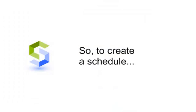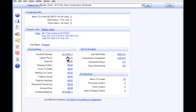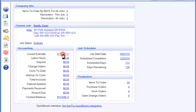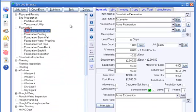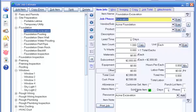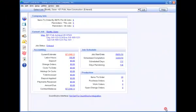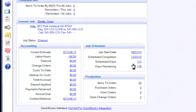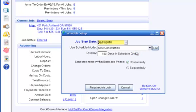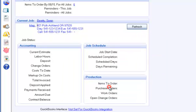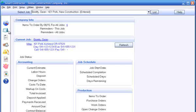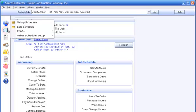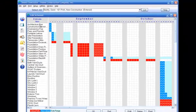So, to create a schedule for a job, all you do is assign a job phase to each item, check the schedule item box, then set the job start date, and there's your schedule.